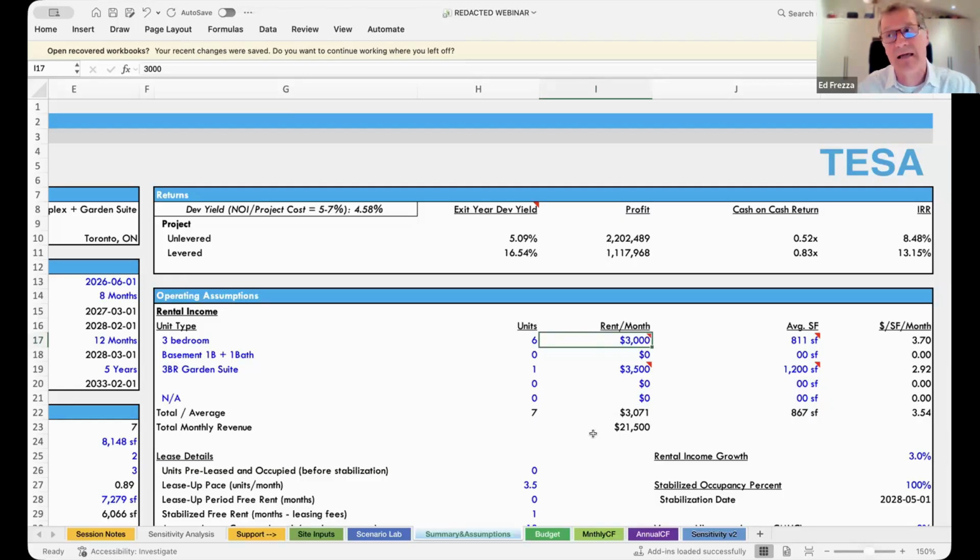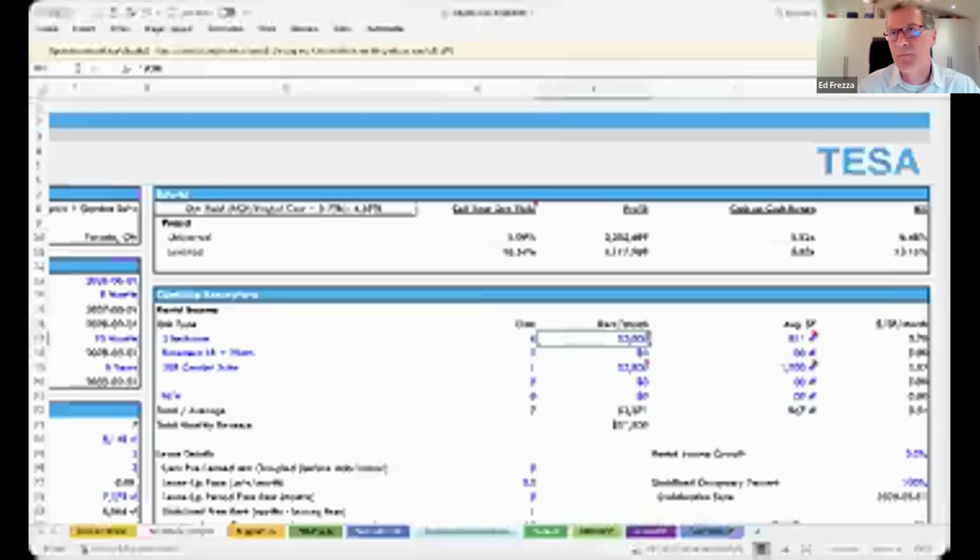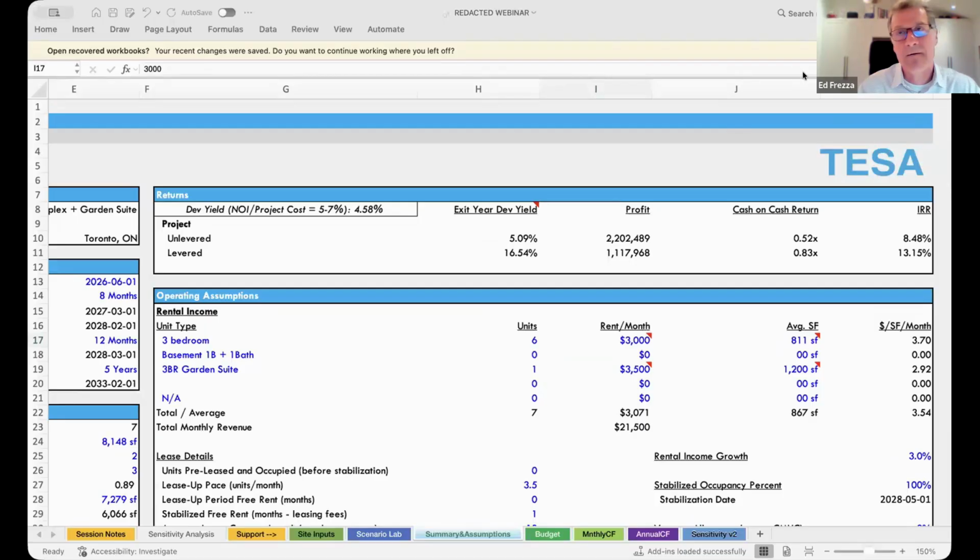Again, remember that CMHC requires that you have 25% of the loan amount of the project cost in net equity. So again, in a hypothetical situation where you have a $1 million property like here, and you spend $2 million hard and soft, and you have a project cost of $3 million, CMHC wants to see that you've got 25% of that $3 million, in this case, $750,000 in net equity, net value outside of the project. So again, you see how having these numbers in this kind of pro forma can allow you to determine that quite quickly and quite definitively, instead of a guessing game.